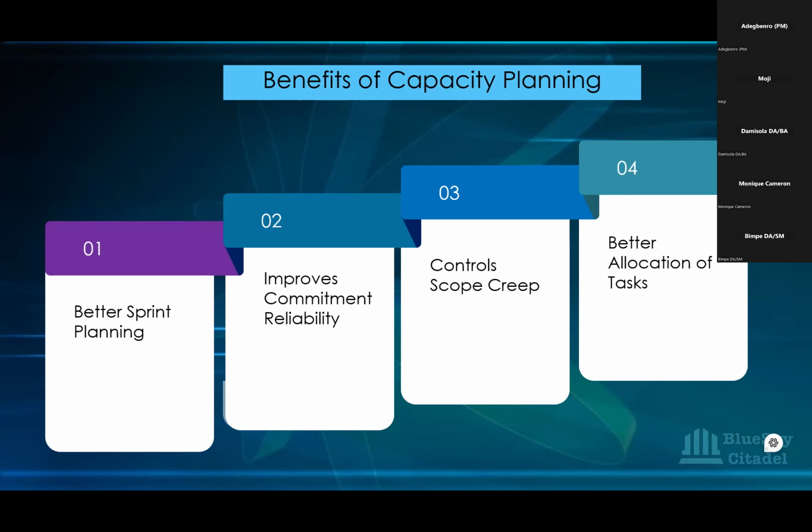When I say prod, I mean on the live website and it needs to be dealt with. It could be that the end users or the stakeholders have changed something slightly. Any unplanned work that comes into the sprint is what we refer to as scope creep. And when you plan the capacity, you're able to negotiate that with the PO because you are aware of the capacity.